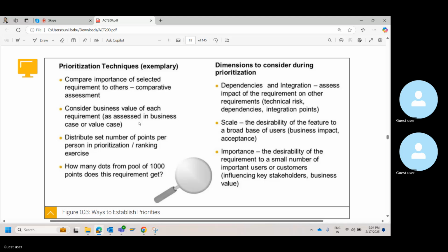The same thing, when you are talking about whenever I put a sale order, the sales manager should get a notification that this person has done a sale for this value. This is not something that will impact the business. It's not going anywhere. It is just a notification. For now, the sales manager can view the report and see how many sales have been done. There is a workaround there, so this can be put under W. This can be done later after go live. So you need to gauge the importance, the use case, and what value it brings to the business, and then take a decision whether it falls under the MSCW brackets.